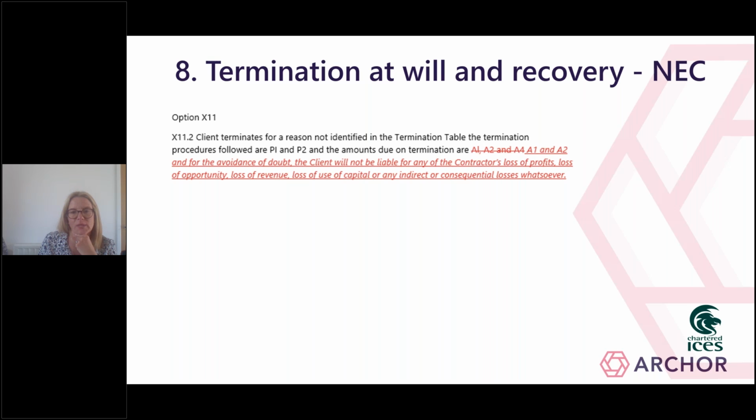Just before I come on to that, we are asked to advise on termination time and time again. Clients come to us saying, I've had enough of the contractor, I want to terminate, it's not going well, I'm not sure if I've got enough to pin on the substantially failed to comply with the obligations, I don't want to serve a pre-notice and have to wait 4 weeks, how do I get them off site? This is when we open the contract and look to see if there's an option X11 or an equivalent amendment, which gives the client the right to terminate at will. And by that, I mean decide to terminate and not have to prove and identify a fault.